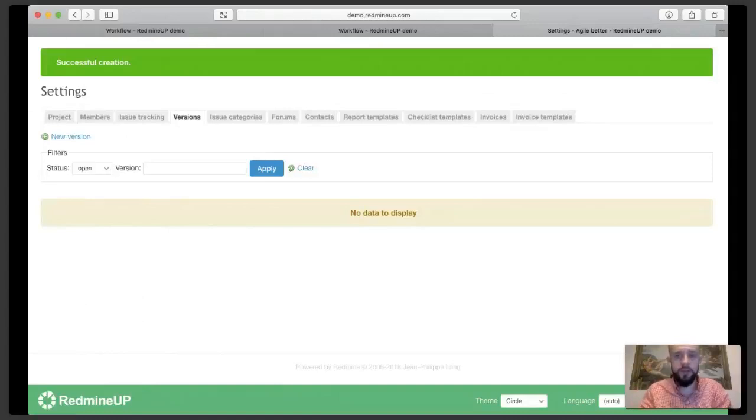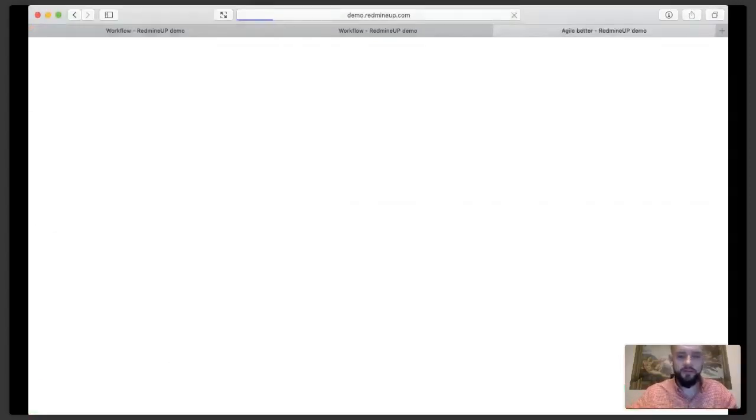This is the most useful and the most practical. You can also have longer or shorter ones. Shorter ones are not good because you won't be able to get much done, and longer sprints are not good because your managers or your clients might push you to include more and more tasks in the current sprint. So you can use the version module to create your sprints.